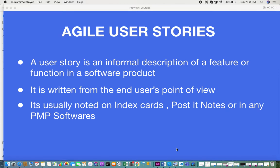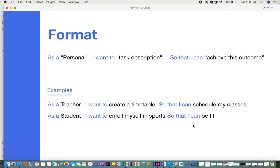The format of user stories is broken down into three parts. The first is 'as a persona,' the second is 'I want to perform a particular task' — that's the task description — and the third part is 'so that I can achieve this outcome.' The first part describes the persona, the second is what the person wants to do, and the third is the expected outcome or solution from performing that task.